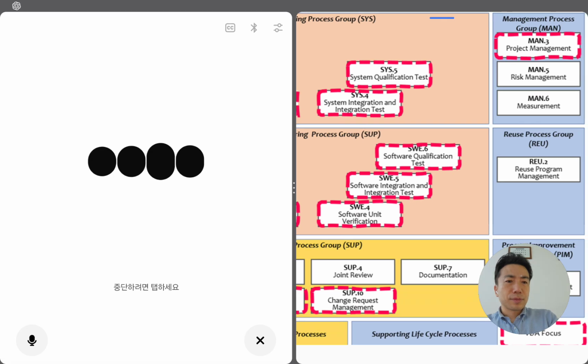For example, project plan defines schedule, milestones, resources. David Kim, v1.2, Oct 10 2025, server project doc, CCB approval, current baseline. Requirements spec, customer functional requirements, R&D team, v3.1, Oct 05 2025, SVN, CCB approval, link to sys.2. You can keep adding rows for test plan, risk register, KPI dashboard, meeting minutes, and so on. Do you want me to fill out a few more sample rows, maybe the full list for a typical Aspis project?